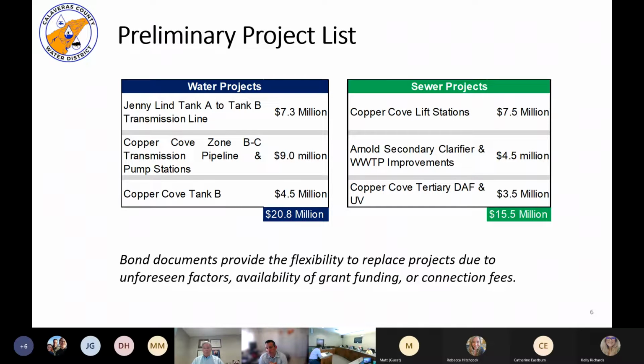at the response and say, oh yeah, if it's going to increase the cost of the project by 20% to phase it, we may not want to do it in that case. But if not, and we can do that piece, the most critical piece, and move on and get something else where that's at that critical point. That's the work that will happen as we develop these projects and bring them forward to construction.